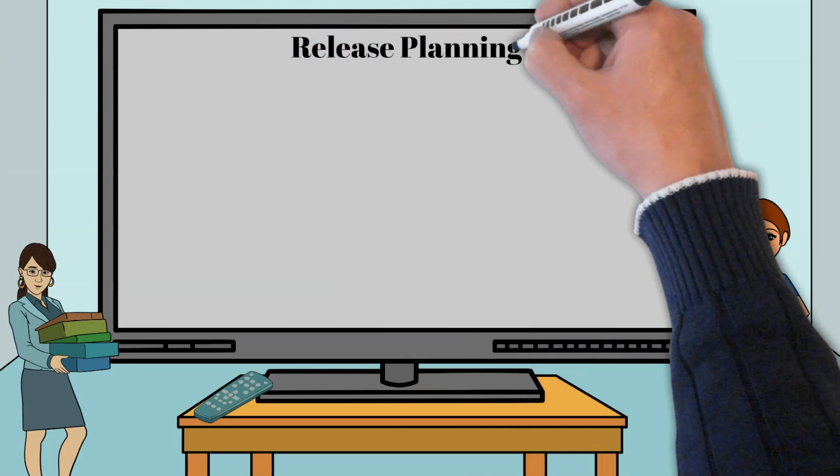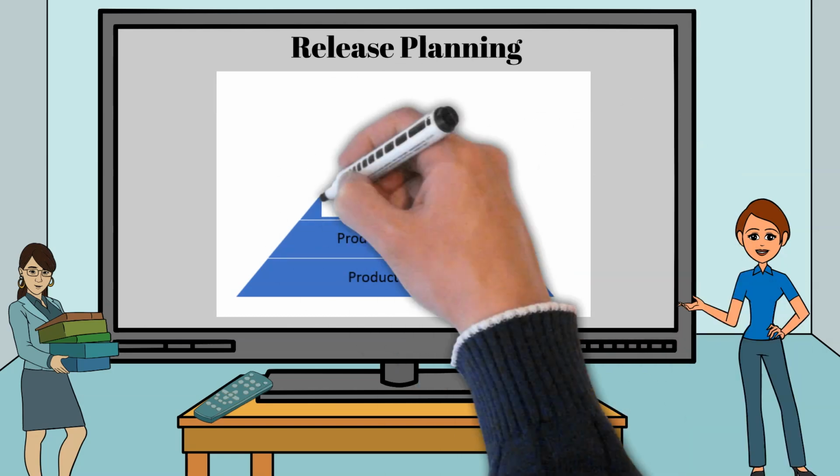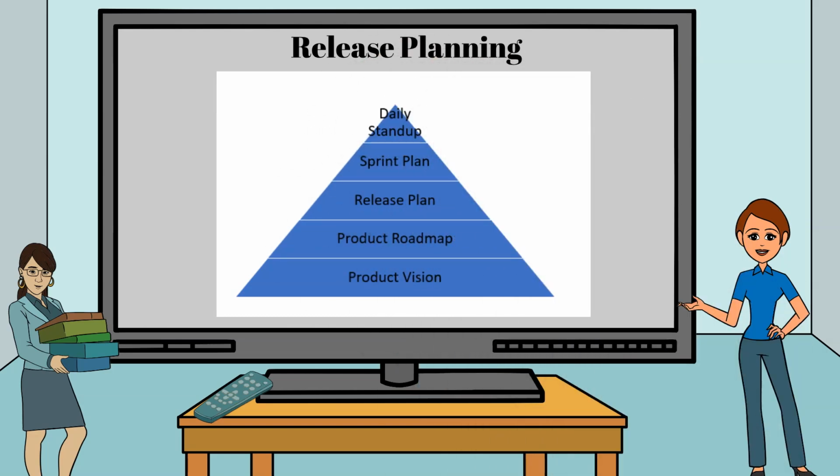Agile release planning is a critical step in the decision-making process. It helps the product owner and the team decide how much needs to be developed and what functionality the product needs to have in this release. The release plan serves as a guide to the project team and summarizes the expectations of what that team should focus on and what the team needs to deliver.